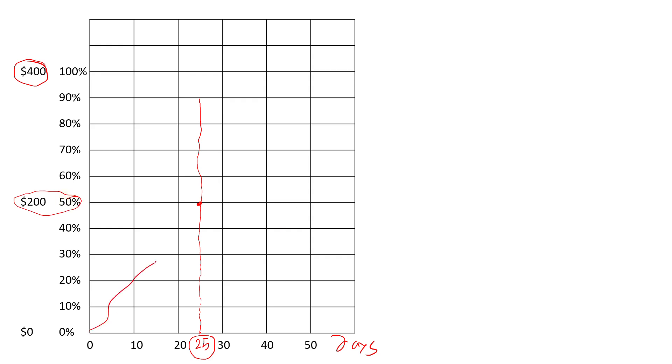Let's say we're kind of progressing like this. Doesn't have to be a straight line. This is called the planned value. It is also called the budgeted cost of work schedule. How much it is scheduled at this point? How much was it budgeted at that time when you are talking about?